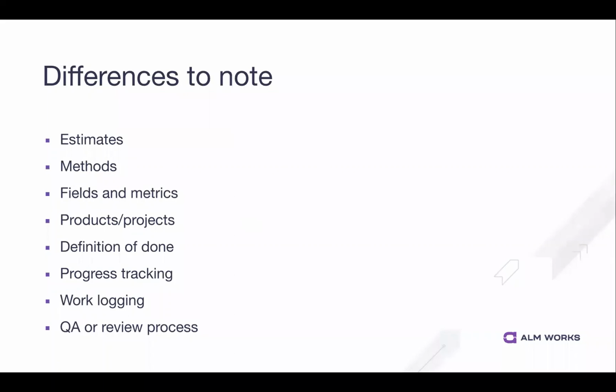Then, of course, we've got our fields, we've got our metrics. I think of metrics as those calculated columns, those formulas to extract: are we on track? Are we at risk? Things like that. And one team's at risk might be, oh, we've got 2 blocking issues. That seems like a big deal, that we're in the way of a lot of stuff. Maybe for a support team where a bug is commonly blocking a lot of issues, maybe that's not an at-risk thing. Maybe that means something different.